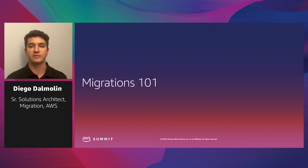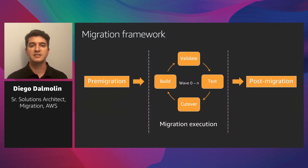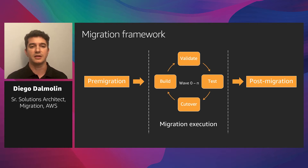Let's get started with an overview of migration projects. This is a simplified version of a migration framework. There are activities that should be executed as part of the pre-migration phase, such as discovering the environment, grouping servers in migration waves, creating a landing zone, defining the EC2 configurations such as instance type and size, subnets, and security groups. During this phase, you may need to validate if the servers and applications have all the prerequisites to run in AWS.